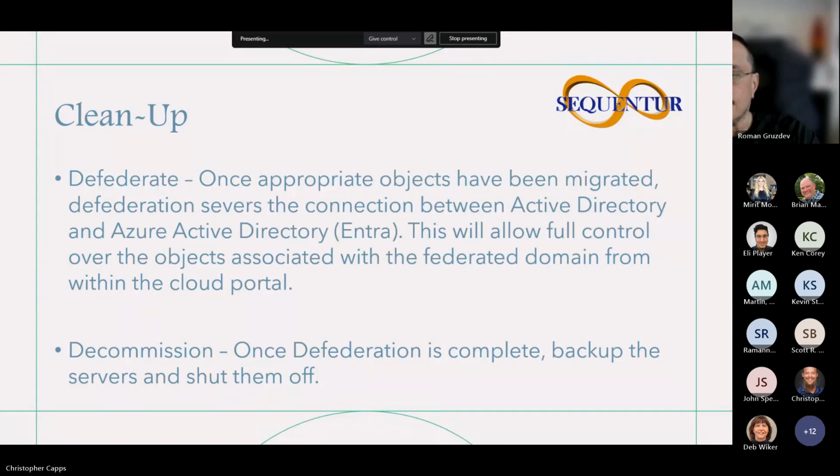So do you have estimates of the elapsed time from start to finish of a moderate sized organization, 100 users, 3 or 4 existing domain controllers? How much time are we looking at to go through the analysis process, the planning process, and then the execution of this? Probably about a quarter, probably about 3 months all in.